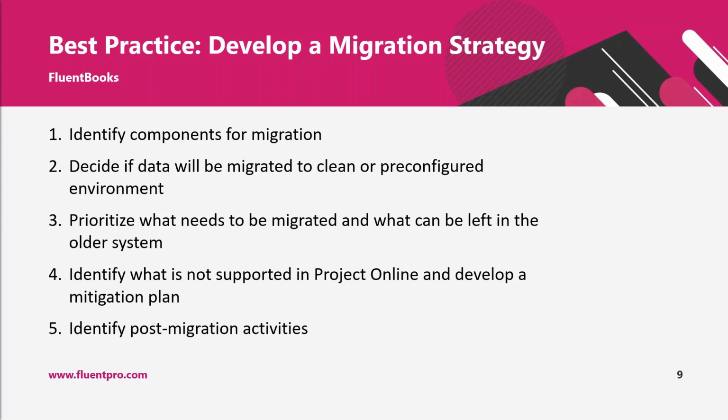For example, SSRS reports that are used in Project Server 2010 and 2013 are not supported in Project Online, and you would need to think how to adjust your reports to the new environment, because in Project Online you would use a data API for reporting and maybe Power BI to create and share your reports. This would need to be planned prior to going live with the new environment.